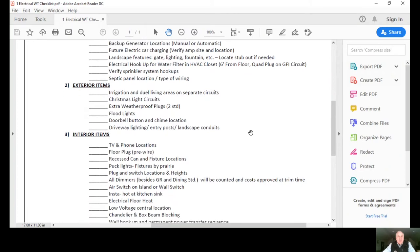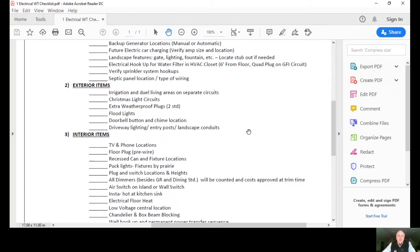Number two, the exterior of the home. We want to review irrigation and the dual living areas on separate circuits. Sometimes people have dual living in their homes and they want to have a separate circuit. They can have a separate power bill going to the other part of their home.